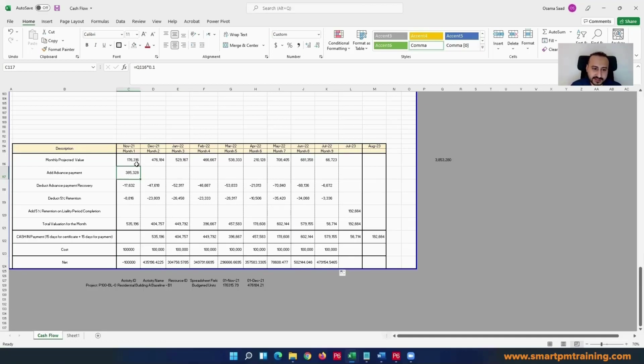In some projects, they make it a condition, like you can consider the project started if you receive the advance payment, or when there is access to site, right? Or you receive approval from authorities. They are all prerequisites for the project to start. And advance payment, I did not see clients delaying it, because it can really hurt the project for the reasons we talked about.